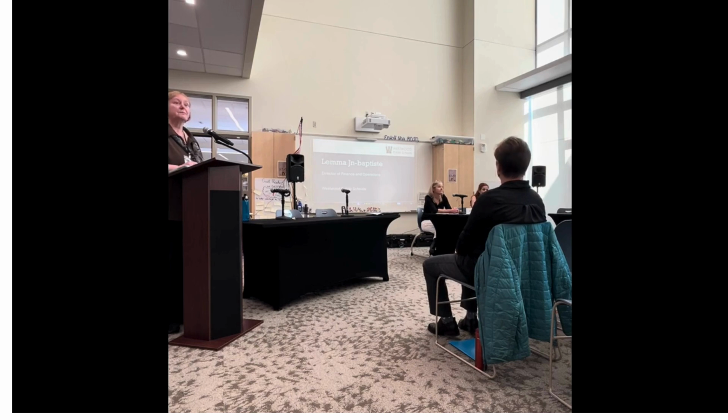Questions? When do you recommend bringing on a consultant, a tax consultant? I think because now you can design mindfully for it, you may want to bring them on early on, just to understand what is important to track. And you also want to know if your OPM fully understands the parameters of the IRA program. If your OPM is able to ramp up and support at this level and advises you to delay, you could delay. But because of the domestic content piece and because of the apprenticeships, you really want to have some tax attorney support early on.